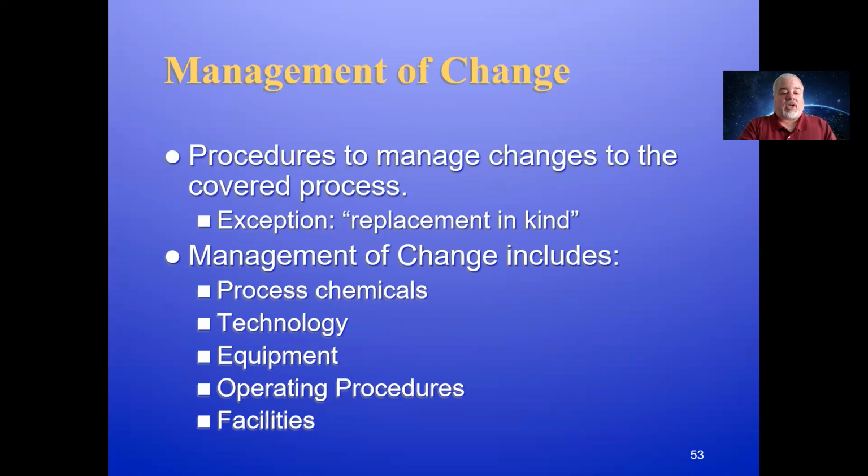Management of change. Again, things are always changing. Replacement in kind does not really cause any change. So I've got one piece of equipment and it's getting old, so I'm going to take it out and put something almost identical. You don't have to do any change management because nothing changed. You just put in a new one.